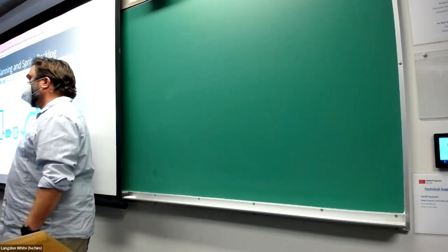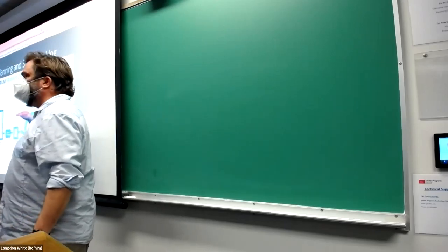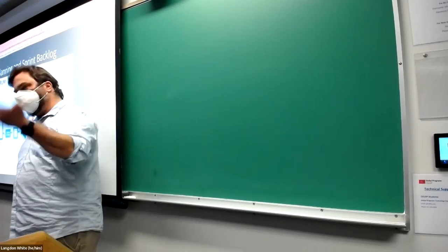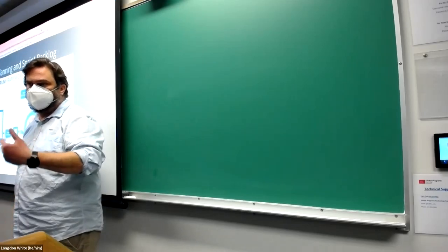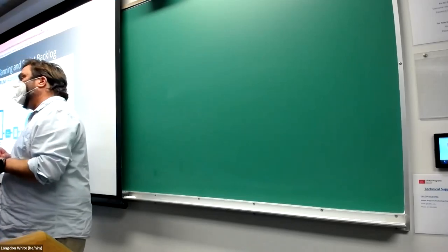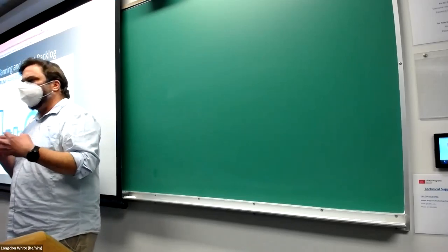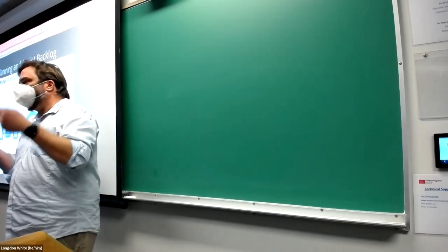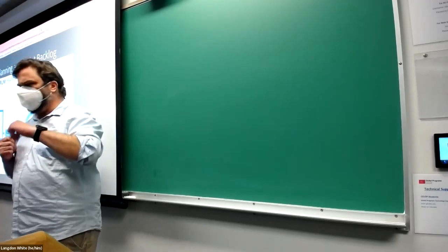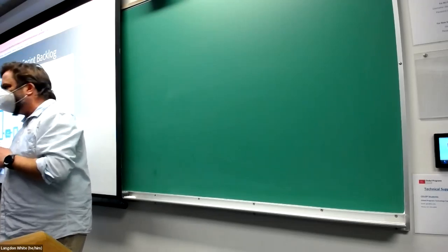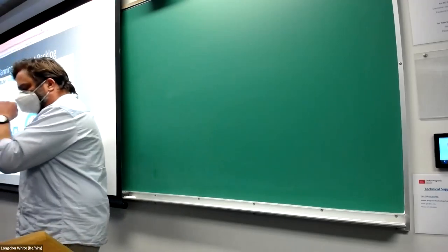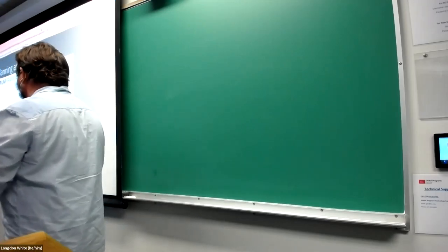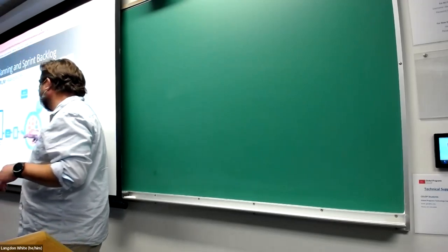The scrum team goes and works on the sprint, and every day they have what's called the daily scrum or daily stand-up. You ask three questions: what did you do yesterday, what are you doing today, and what do you need help with? This keeps the whole team aware of what everyone is working on. It might seem like a waste of time, but sometimes you hear what a colleague is working on and realize there's synergy — maybe you just did something similar under a different name.